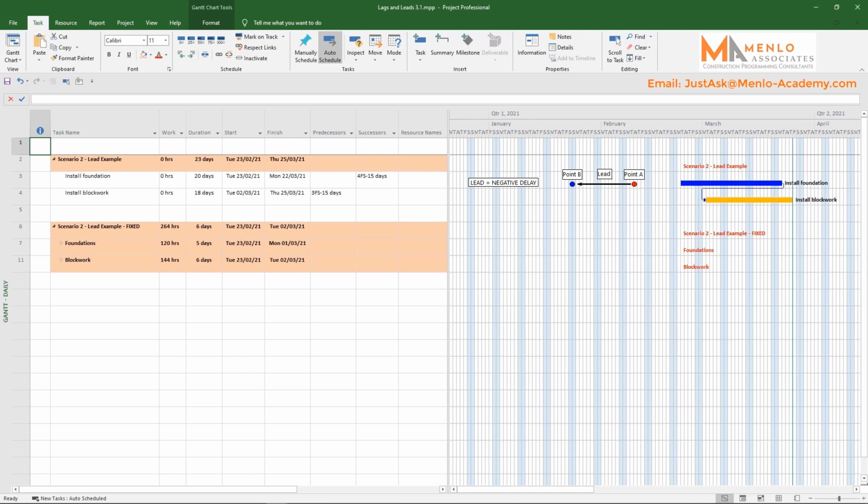We know that there are 3 bays of foundations and block work, but we've separated all of this into only 2 tasks. If we break down the foundations and block work into separate tasks for the 3 bays, it means that we're designing the program in a way that reflects the fact that things inevitably do change. When things do change, we can also get into illustrating this quickly and easily.